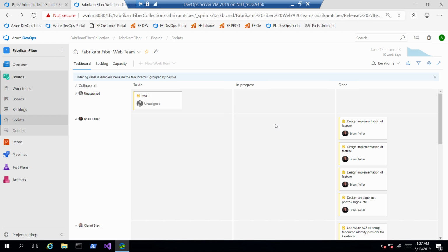You must realize that TFS, on that point, is basically just a work management system. It's not a resource management system. So this looks at work, at what is left to be done, the requirements, and it's happy to manage that and assign it to people and so forth. But there's very little in here that will manage you as a resource. So if you look at your Project Server, I think it's still called Project Server, that is actually resource management, which projects are you working on, that kind of stuff.